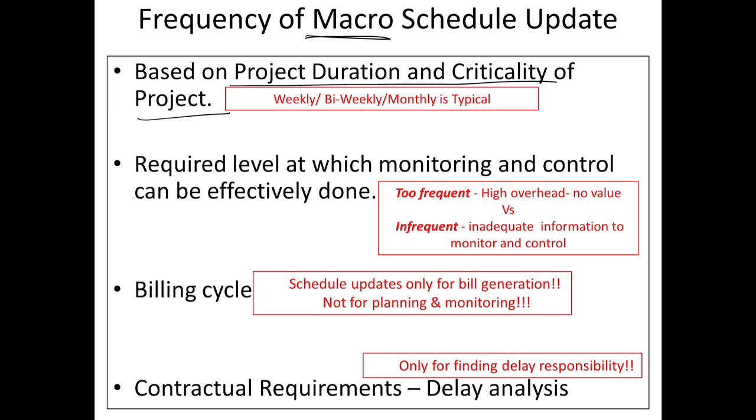So, again, to summarize the slide, we should really do updates based on planning and monitoring requirements, and that can be weekly, bi-weekly or monthly depending on the duration and criticality of the project.